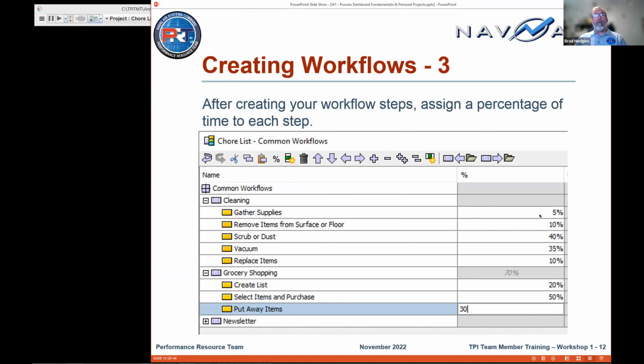All right, so I've talked about this already. You have a percentage out on the side here. And one of the features added to the dashboard is that if you don't have the steps adding up to 100%, like you see these two here, this one hasn't been entered yet, so the tool doesn't know that she typed a 30. It shows you a percentage. If it's not 100, it says, hey, by the way, it doesn't add up to 100. And you don't have to add up to 100. There are teams that make it so that the author has 100% and the inspectors have additional time above and beyond that. So there's no constraint here. It's just a matter of giving you an idea that, hey, you may want to add some more work.